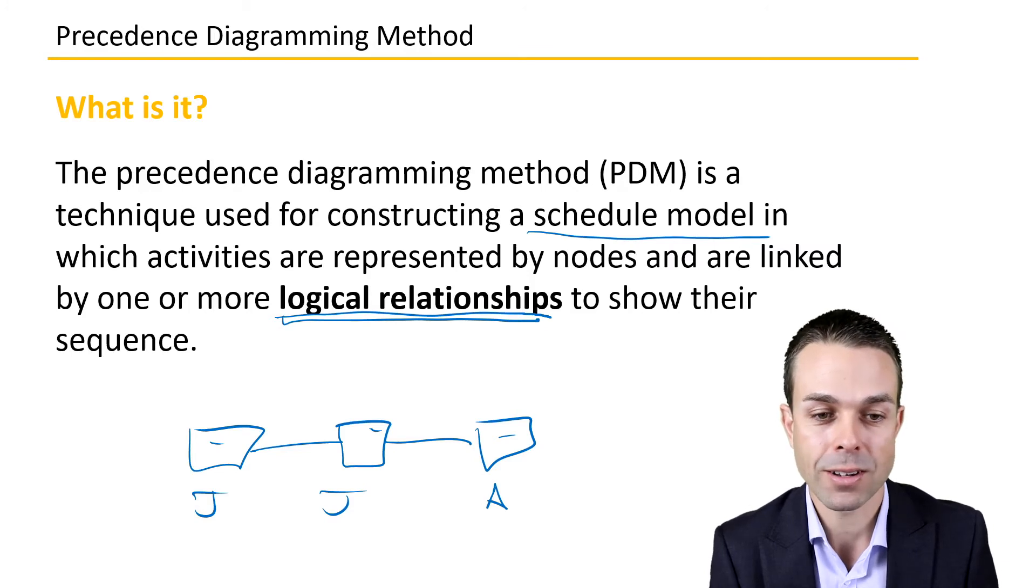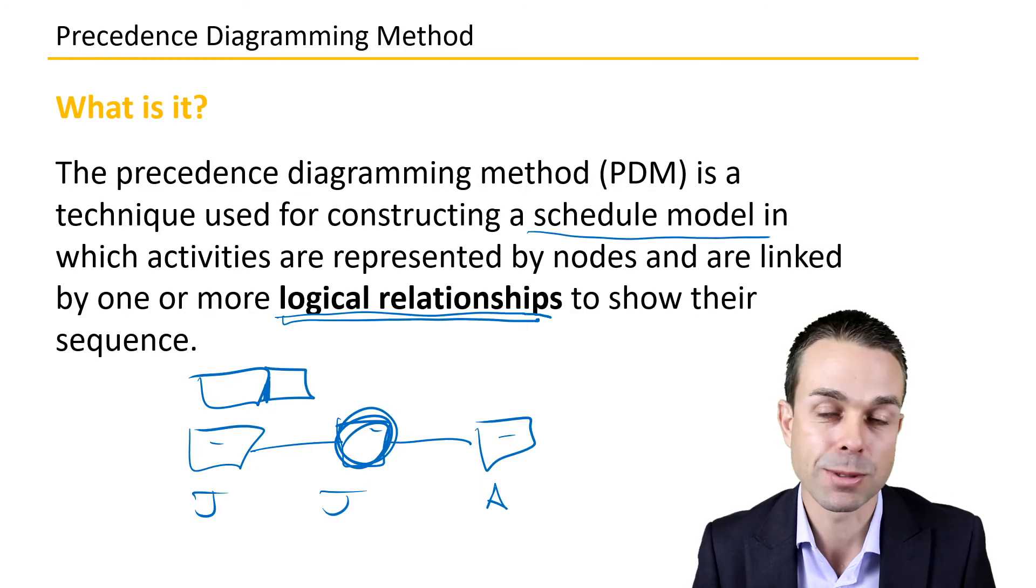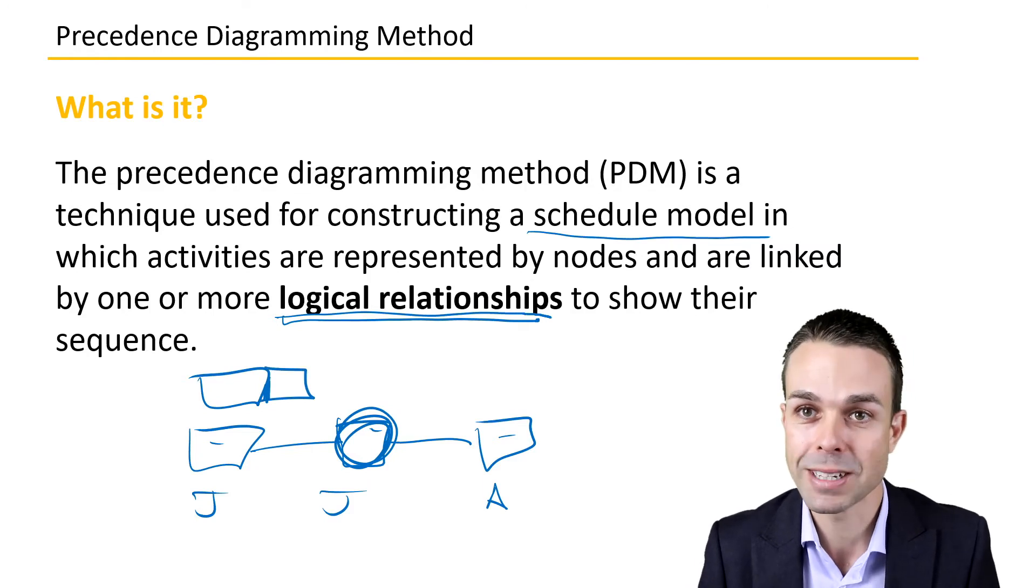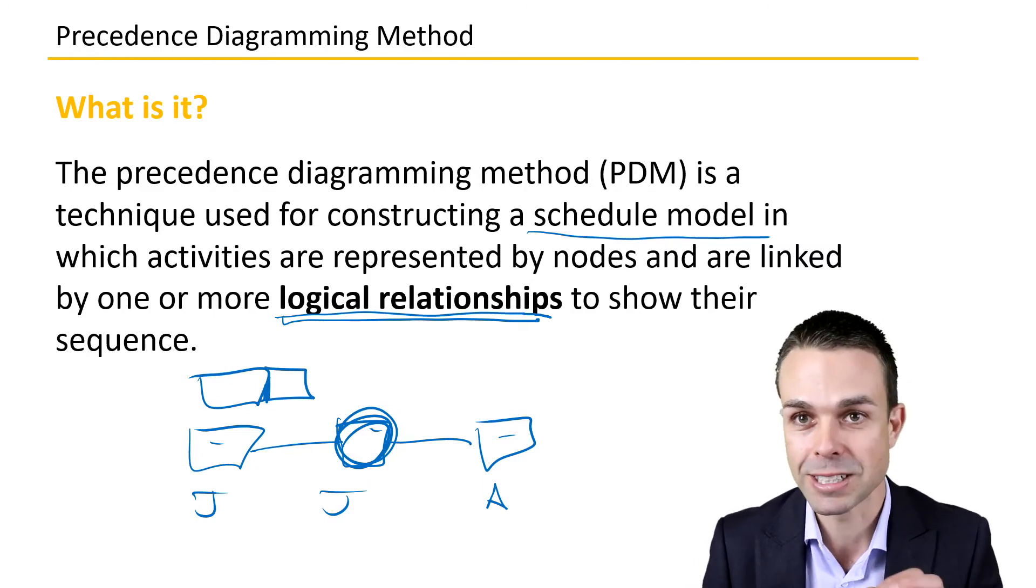What can start when this one starts, and what needs to happen? For example, maybe this one needs to finish before this one can finish. The PMBOK guide goes into these logical relationships in more detail as part of the Precedence Diagramming Method.